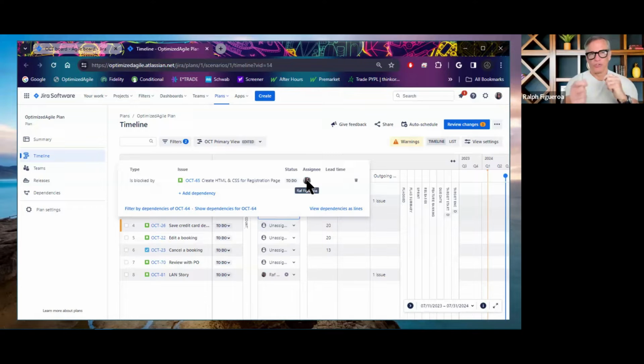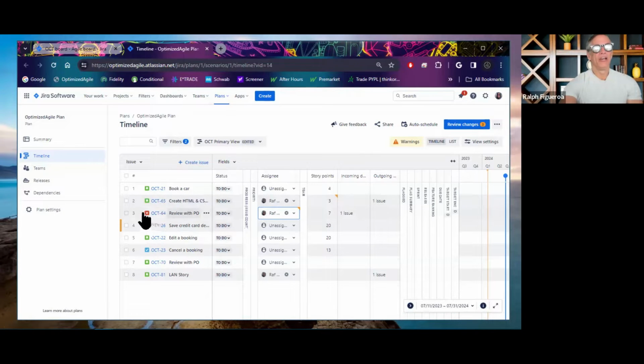What's your plan? And so you can have conversations about timing. And if the person says, no, I won't be able to do that in the sprint, it will be in the following sprint, great. I can stack rank, just like you can do in Jira. I can stack rank that story down below, so that it takes a lower priority than the other stories that are at the very top, so I can continue to do my sprint planning with my top stories.